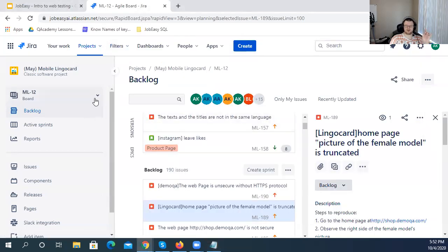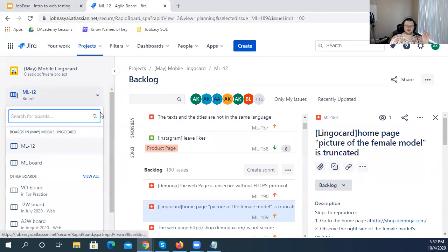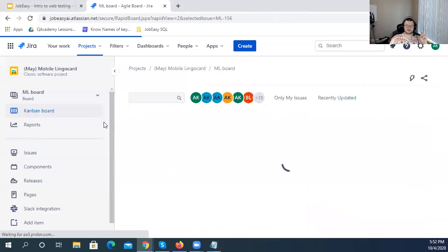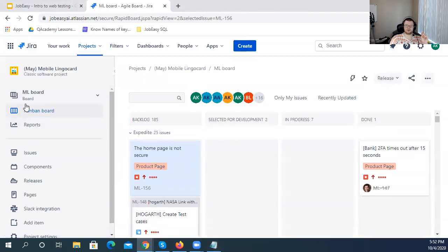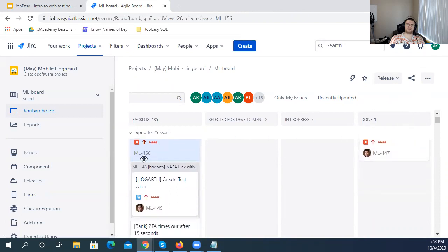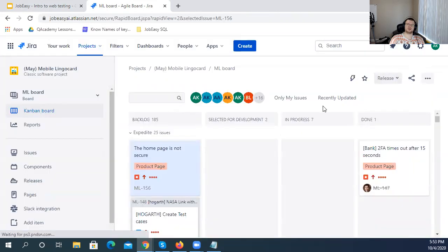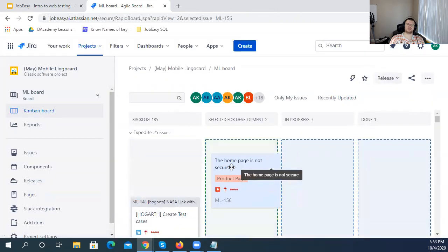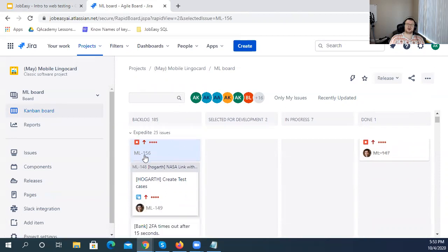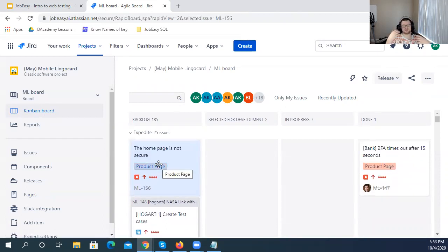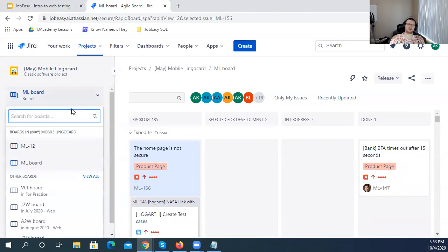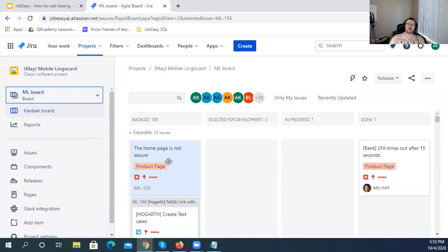Now, we can also talk about Kanban really quick, and I'll show you what Kanban is and why it's kind of cool for QA to manage it in Kanban. Here's a Kanban board. Kanban is another style and approach to development, similar to, well, not similar, but there's Agile, there's Scrum, there's Waterfall, there's Kanban. And in Kanban there's no time within a sprint to complete something. Everything is just in the backlog, sorted by priority, and taken into development according to the priority. This is mostly used for bugs, and this is good for QA. Like, you are not taking part in the sprint, you're not adding complexity until you add bugs.